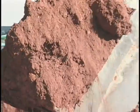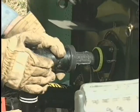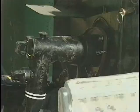Joint trench has meant more to the progress in real estate development business than about anything I can recall in the last 25 years. Formerly, we had the various utilities with gas, electric, and so forth coming through, water, of course, all these utilities coming through and taking 6 months maybe to get all the utilities in place and 5 different messes. Now we can get water out of the way early, and then all the utilities come through with Fishel in one trench. It works terrific. We're done in 30 days maybe, if not better than that. And it lets us move on with a nice, good-looking, cleaned-up development.